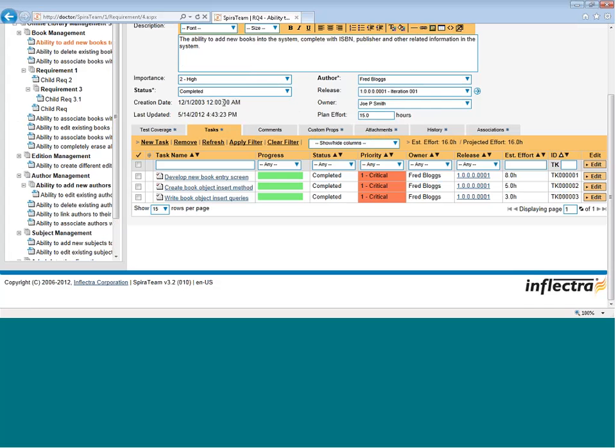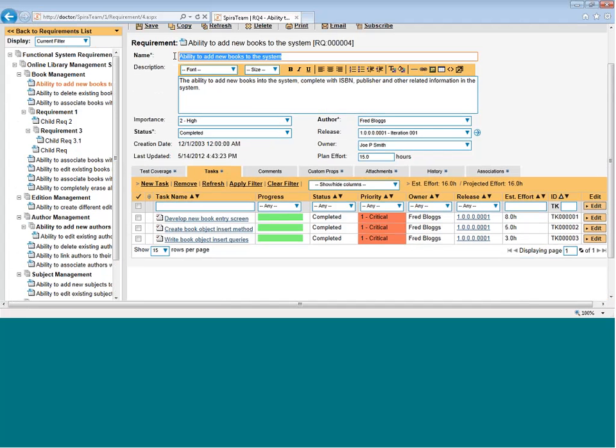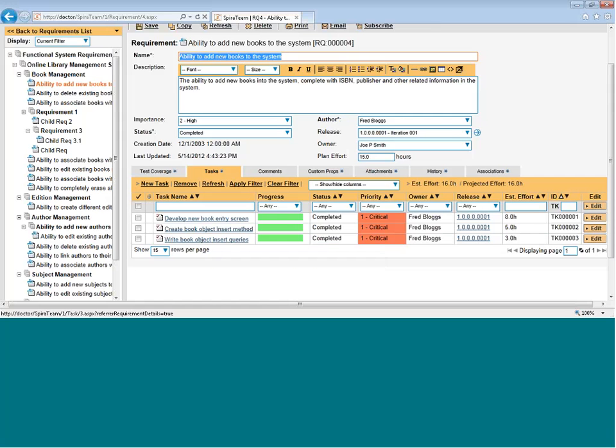From a development standpoint, as you entered all your requirements, which in an agile methodology are often called user stories, those requirements or stories are then used as the basis for generating technical tasks or development tasks. These will be assigned to the developer to carry out the building of the functionality. For example, we have here the requirement to add new books to our library system. These three tasks are the development activities that would have to be carried out to actually build that functionality. Here you can add additional tasks, remove tasks, and when you add a task, that's a new task that a developer will have to carry out for this requirement. The requirement status will derive itself automatically from that of the tasks. So when you add tasks to a requirement initially, it will be not started. All the tasks in the requirement will be not started. When all the tasks are completed, the requirement itself will become automatically completed as well.